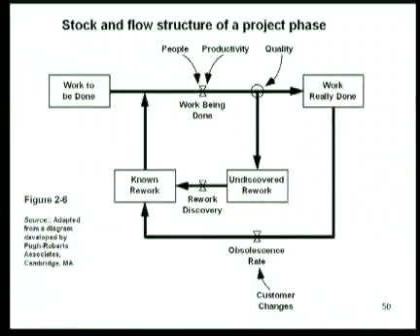What's shown here is, again, I'll refer to this again later, the stocks and flow diagram, the stocks, for example, the work to be done, the work really done, there was rework to be done, undiscovered work, obsolescence associated again with that technology development, feedback dynamics here, things that were not anticipated by either the Navy or Ingalls when they initially got into this problem.